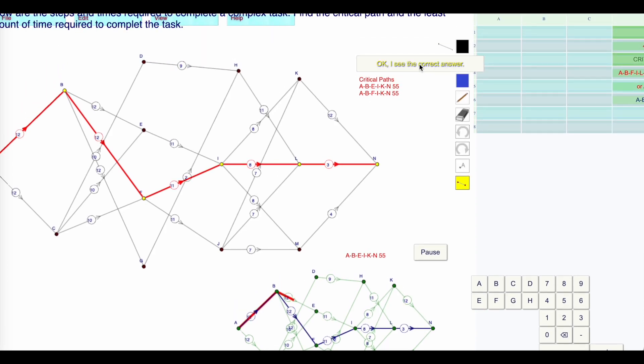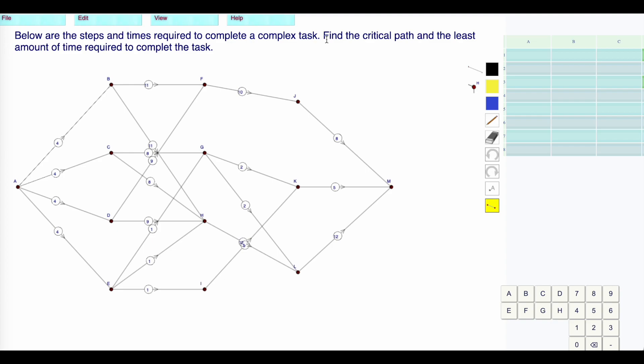Let's try another one. Below are the steps required in time to complete a complex task. Do I need to move any of these nodes around? I'm just going to move these nodes around a little tiny bit. I'm going to start with the four. I can see I have 11s up here. This 11 leads to a 12, which leads to another 12. That looks like my critical path.